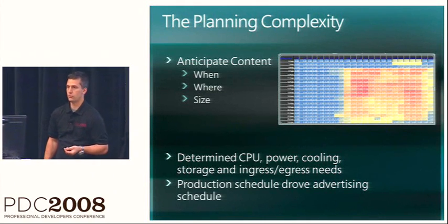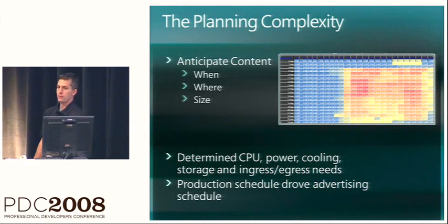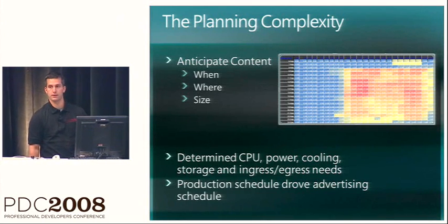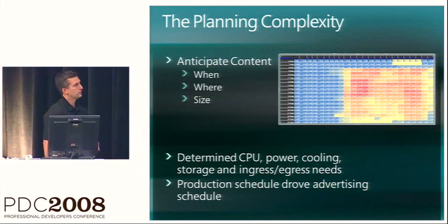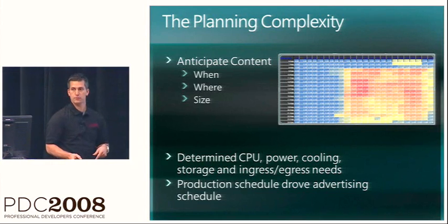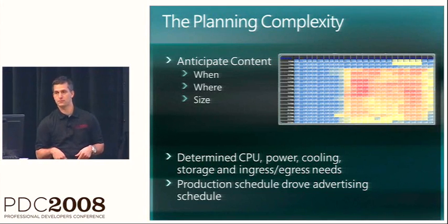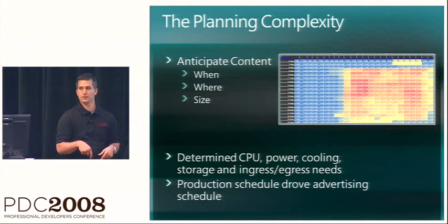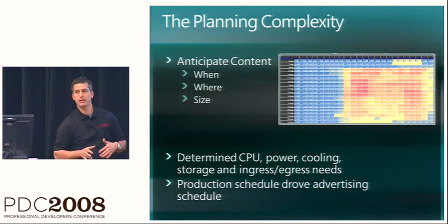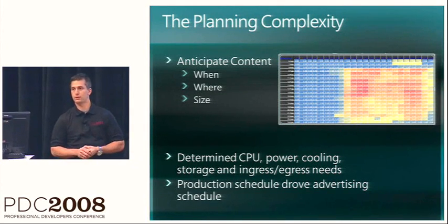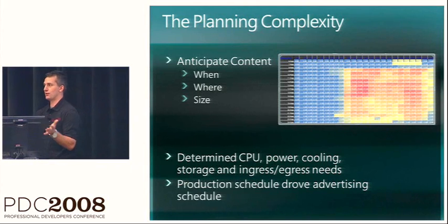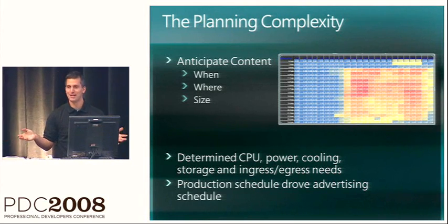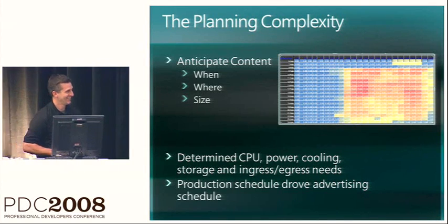Intel was working on a new Penguin processor that provided more efficiency and didn't consume as much electrical power. So they put their build on hold for about 3 months, waited until those new Penguin processors came out, and then finally shipped everything on a boat end of May, early June. Took about 6 weeks to get over to China. They unpacked everything, turned it on, and they were like, OK, we have enough infrastructure to do this.